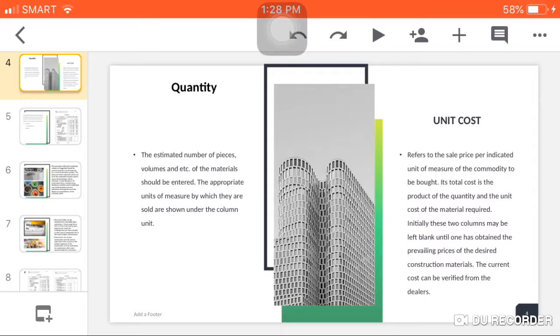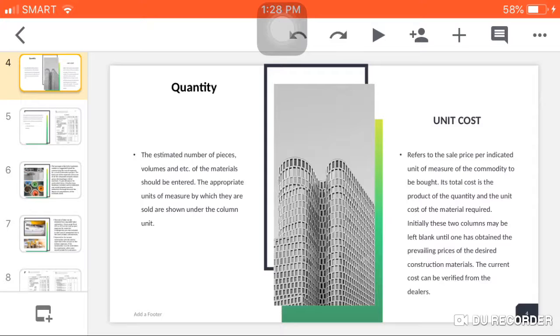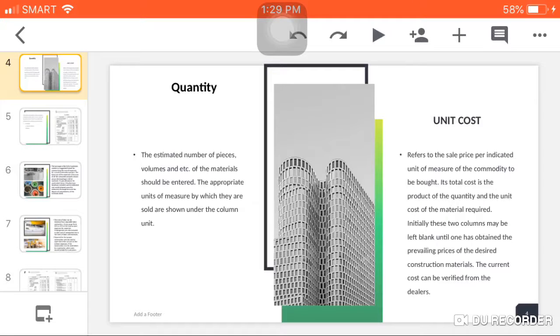For the quantity, this is the estimated number of pieces, volumes, and etc. Quantity can be number, volumes, or area. The appropriate units of measure by which they are sold are shown under column unit. For the next column, the unit cost, this refers to the sale price per indicated unit of measure of the commodity to be bought. Its total cost is the product of the quantity and the unit cost of the material required.